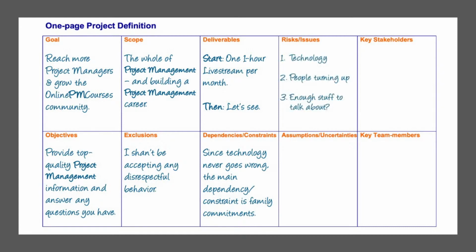It's, again, always going to be the case that in a real project there are things that can go wrong and there are things that already have gone wrong. And that's the difference between a risk and an issue. A risk is something that could happen in the future. There isn't certainty about it, but there is a likelihood. An issue is something that either has already happened and you need to deal with it, or you know is going to happen and therefore you need to deal with it. The timing, that can vary.